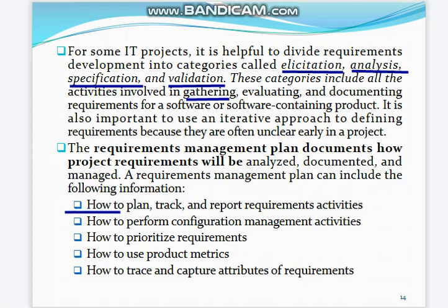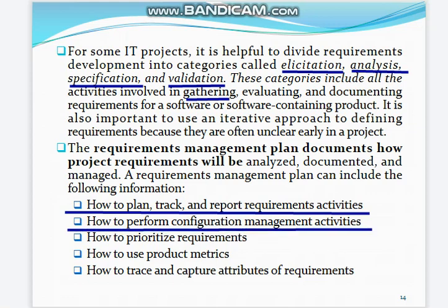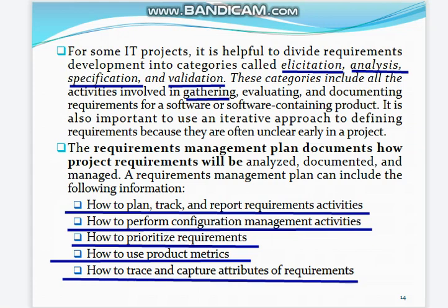Number one is how to plan, track, and report the requirement activities. Number two is how to perform configuration management activities. Number three is how to prioritize requirements. Number four is how to use product metrics. Number five is how to trace and capture attributes of requirements.